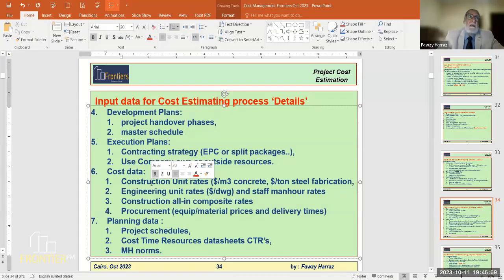So, for example, if one activity, say, equipment foundation, this is a concrete activity called equipment foundation. Which equipment? Which area? So the CTR actually defines which equipment and gives the equipment numbers, and even puts the reference drawing where these design information are available for this equipment. That defines it actually, not just leaving it open. So someone may say this is in the activity or this is outside the activity.